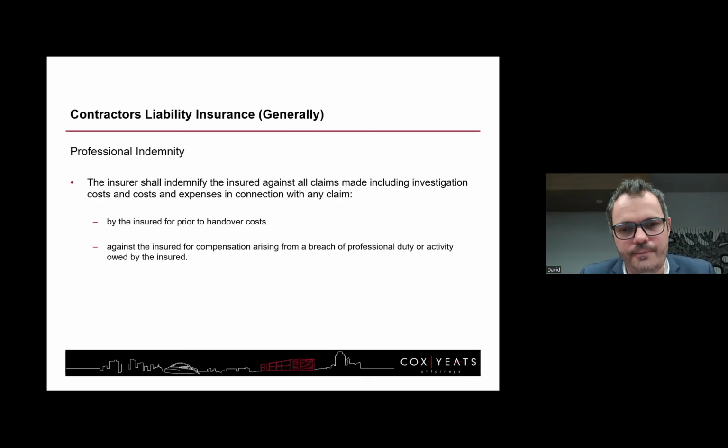So the insurer is in for a very long ride. That's why the Section 31 is so critical that you get on that as quickly as you can, because as you can imagine, it happens on day one. You've got to be there for the Section 31, and the Department of Labor will traditionally shut the site so they can investigate, and you've got to be there to help your insured out if they've got that cover under your policy.